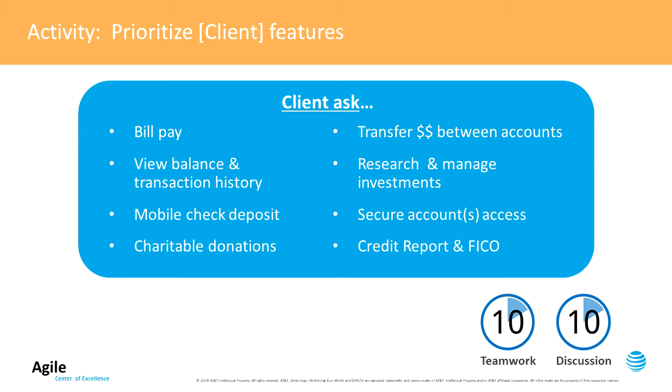What about usage patterns? Maybe there's an opportunity to talk to employees like tellers and find out what are those activities that customers of that bank are most asking the tellers to perform. Because if we look at that from a prioritization perspective, maybe we can reduce some of the time that tellers take to complete that work. What about cost of delay? Is there a cost associated with the fact that we don't have that functionality in our initial app? Empirical data. What data is available that can help us understand what's most important or what's least important?